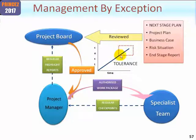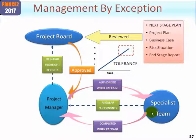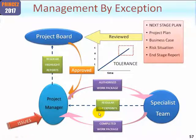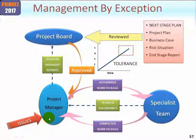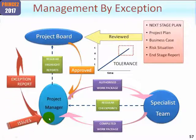What dictates exception is of course the tolerance band, whatever metrics that happens to be. Ultimately when the work package is complete the team advise the project manager, who needs to satisfy themselves that is the case, and now they may well issue the next work package and so the process continues. But let's imagine during this particular stage that an issue is raised — we'll assume it's a request for change. The project manager would log it on the issue register and then carry out an impact analysis to determine the impact if this change were indeed implemented. Let's suppose as a result of that the project manager forecasts that if this change were to be implemented it would blow stage tolerance.